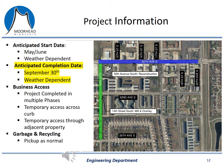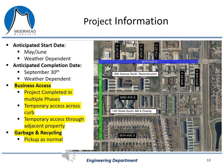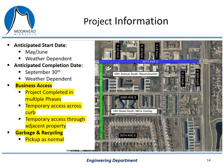The mill and overlay on 14th Street South should not take very long — likely a week or two at the most. Maintaining business access is a priority for us during the project. We understand that you have employees and patrons coming and going from your properties, and we're going to maintain access throughout the duration of the project. Some ways we'll do that may include a temporary gravel curb crossing, a temporary driveway, or a temporary access road around construction. If you only have one driveway access to your property, we may ask that you work with a neighboring property to access a side street through their parking area. We'll also be providing business signing at our detour locations so that the public will know how to get to you. We're also anticipating that garbage and recycling pickup will continue as normal.